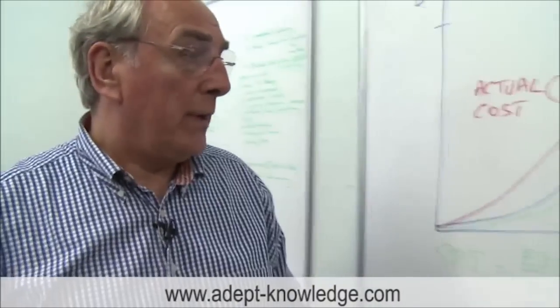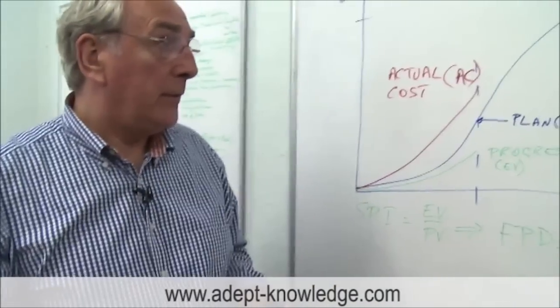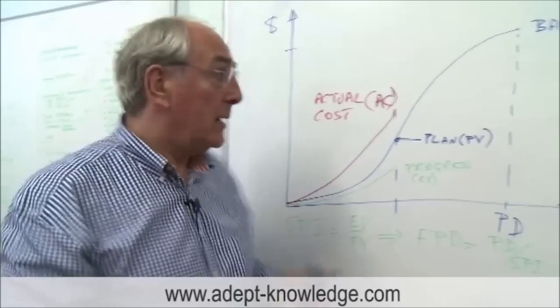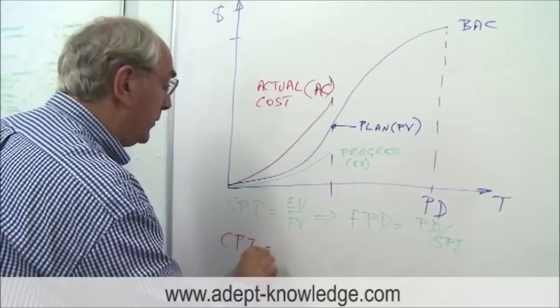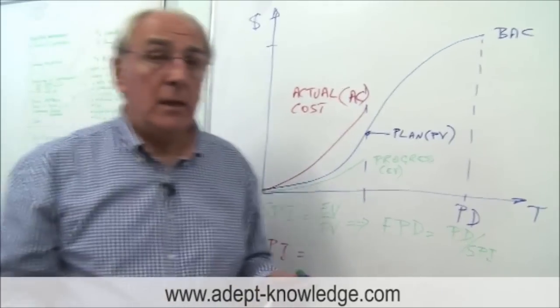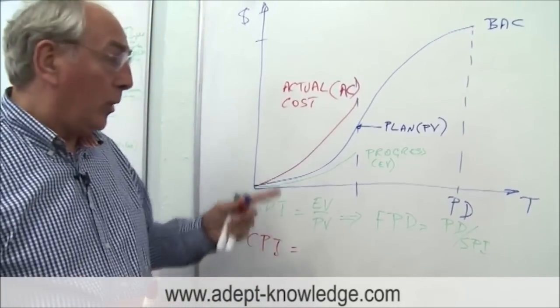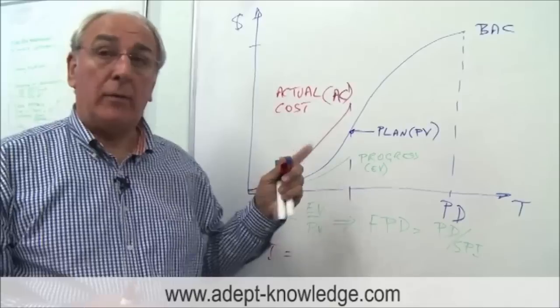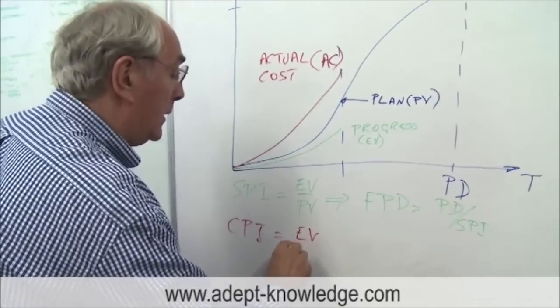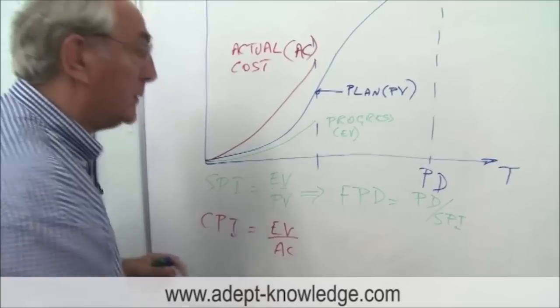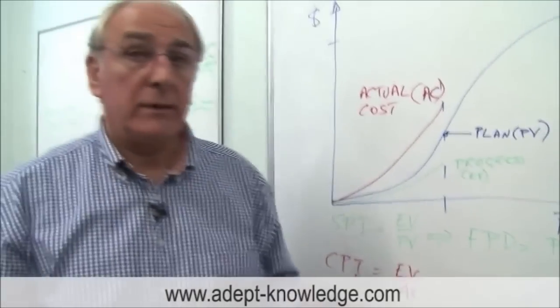So we can now measure what I talked about as being the cost performance index and that cost performance index some people call that productivity or efficiency and what we're saying is what did we get for what we spent? Well what we got was the earned value. So that's our earned value divided by our actual cost. So that's our efficiency or productivity.